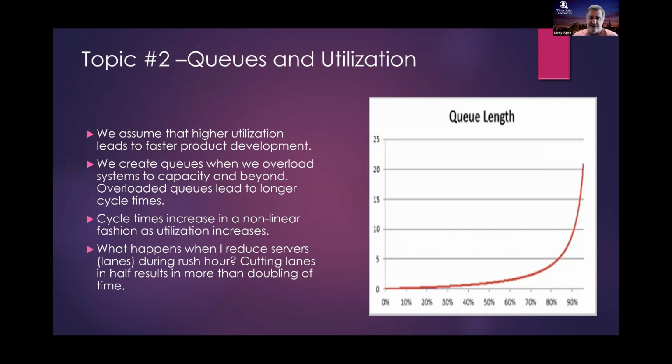What is the capacity of the system and how do things move through the system? As we increase the utilization of the system, which is the horizontal axis, our wait time increases non-linearly. Almost every system has this type of footprint, and it's just a matter of at what percentage we start to see this huge increase in wait state.